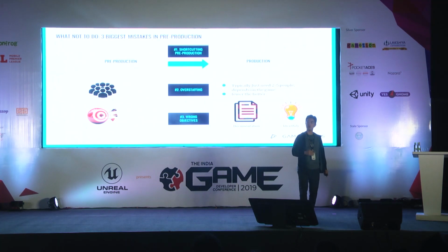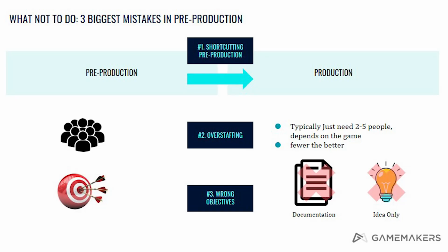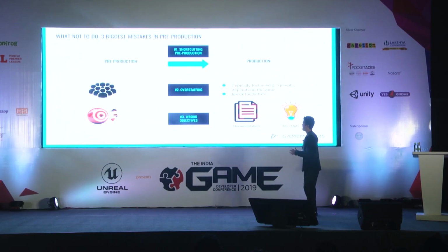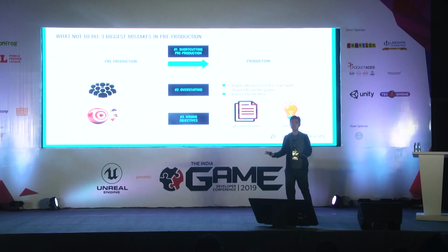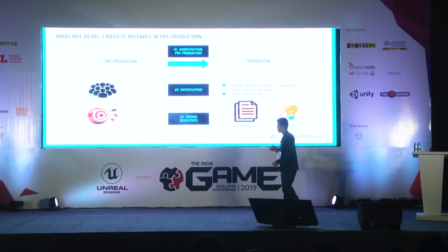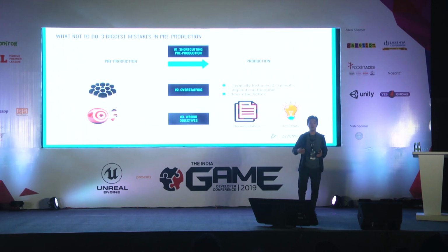And this happens very often at large companies because oftentimes the way that games are greenlit is based upon revenue targets, right? And so it's like, okay, we need to make this much revenue. Let's work backwards to when we need to launch the game. And sometimes there are delays and it's like, okay, we don't have the pre-production done, but let's just go. And so a soft launch that was supposed to take 8 months might go to 4 months, might go to 3 months. And pre-production may just completely be skipped because there's just not enough time, right? And so having worked at a number of large companies before, I can tell you this happens over and over and over again. You know, I think we've seen this movie before, but it continues to happen over and over again.